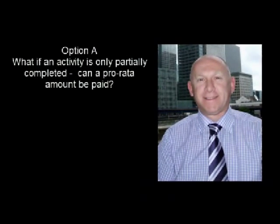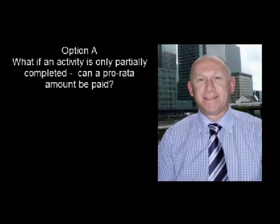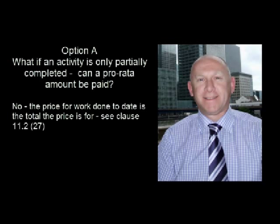What if an activity is only partially completed? Can a pro rata amount be paid? Unfortunately, no. The price for work done to date is the total of the prices — this is Clause 11.2.27.